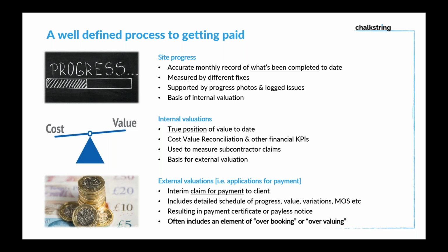But the key thing here, I guess, is the fact that very often that external valuation, which of course is done for a different purpose than your internal valuation, will or may include an element of overbooking or overvaluing. And of course, there's a number of reasons why you might wish to do that. You might have walked around site middle of the month for various reasons, and you might be projecting your position at the end of the month. So you might need to overbook a week or 2 weeks in advance.